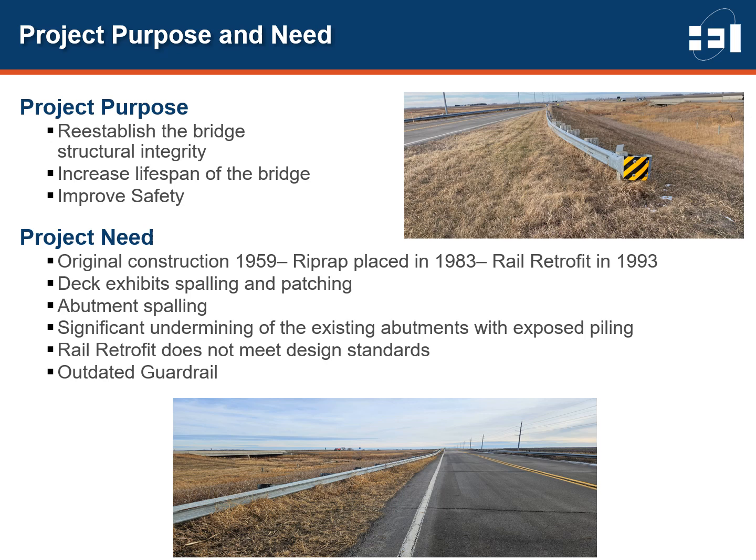The project purpose is to repair the existing bridge, reestablishing the structural integrity of the bridge, increase the lifespan of the structure with a deck overlay, and improve safety of the structure by replacing the outdated rail retrofit and guardrail off the ends of the bridge.